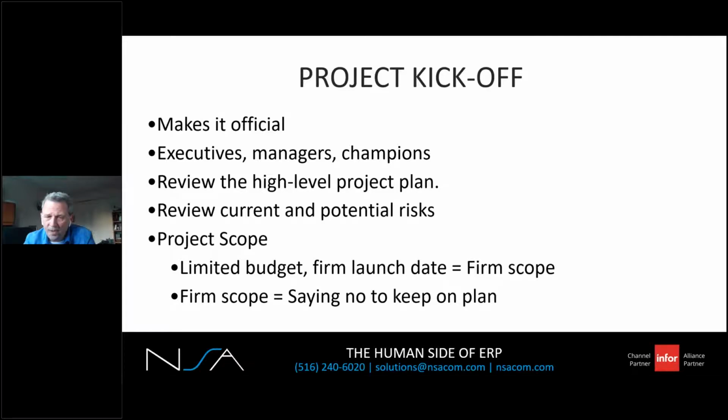Discuss the scope. What's included, and just as importantly, or maybe more importantly, what's not included. You have a limited budget, you have a firm launch date, that means you have a firm scope. This means you'll have to say no sometimes when things change. So manage this from the beginning. Plant this seed during the meeting. CSD won't solve everyone's problems on day one. If nothing else, moving to CSD is a new foundation to make future improvements possible.